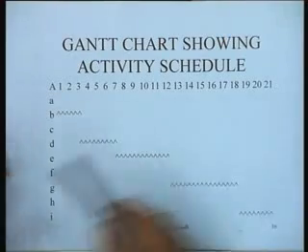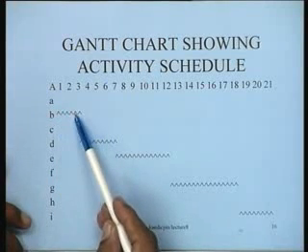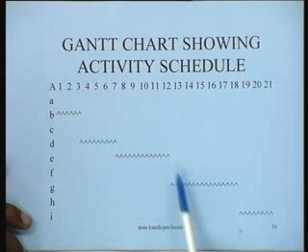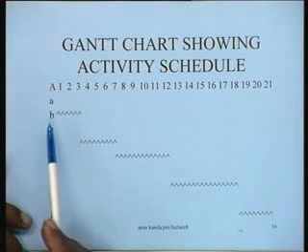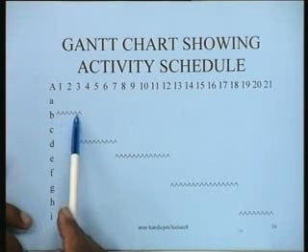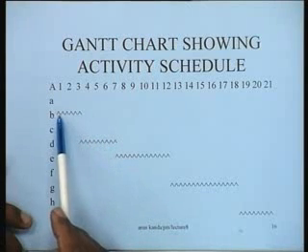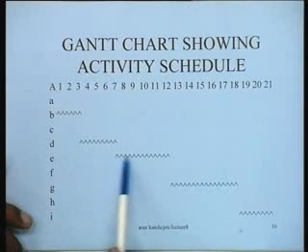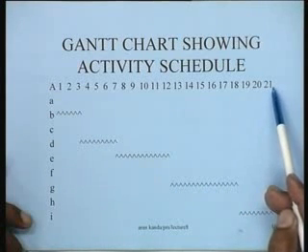In this particular case, what we find is that these activities B, D, E, G and I are critical activities, so they have no floats. Their values are fixed and they must occupy the time slots as shown, and you will find that the durations of the critical activities add up directly to the project duration of 21 days.